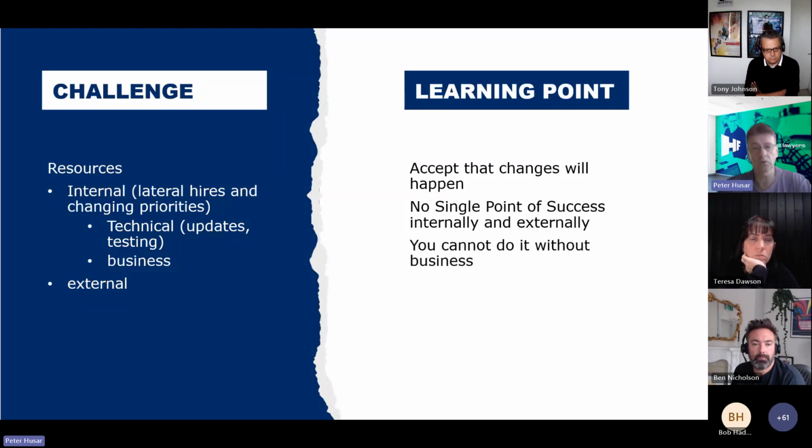And also, you cannot do it without the business. Sometimes people assume that the IT team will do everything and we will just sit and it will start to work. No. Business resources are crucial to go in the right direction and do it well. And it won't be like 10 minutes per week. It can be hours and hours, not only during the requirements gathering, as I mentioned, and then working with the BA, then developers will build it. But then there is testing, and this can be really time consuming and without it you can go wrong. So when you are discussing with the business, just don't underestimate how much time they will need to put into it as well.